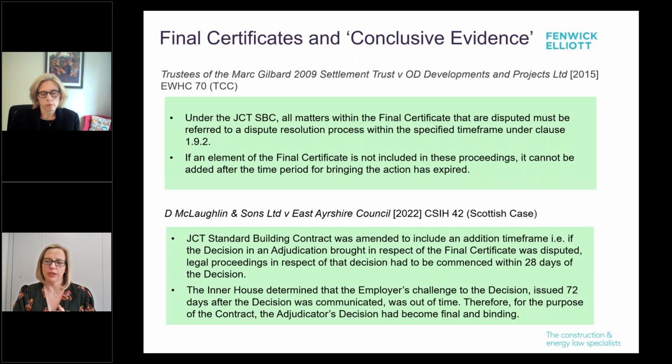In terms of how the conclusive evidence provisions have been applied in practice, there's some useful guidance to be found in the case law. In the case of Trustees of Mark Gilbard 2009 Settlement Trust and OD Developments, the judge held that clause 1.9 timeframes will be upheld, and confirmed that all elements of the final certificate that are not agreed must be referred to dispute resolution within that deadline.